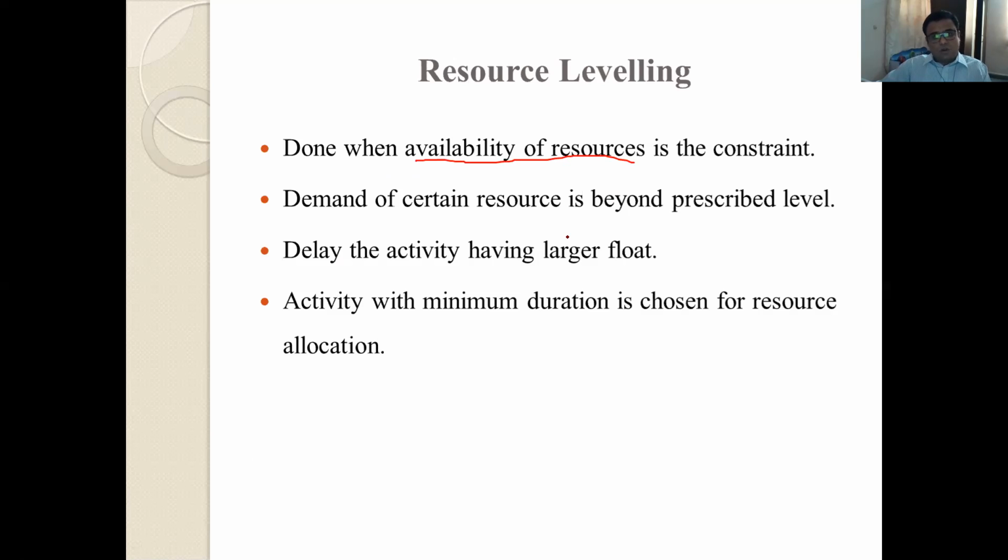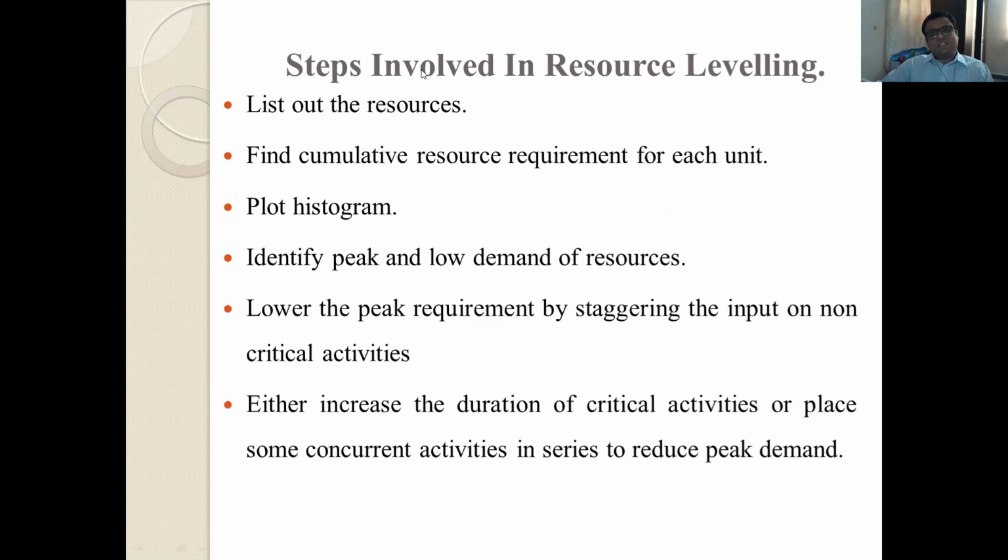Okay, so when we delay the activity, first we have to find out the activity with minimum duration, which will be chosen for the resource leveling. Okay, so these are the steps involved in resource leveling. List out the resources, find cumulative resource requirement for each unit, plot histogram, identify peak and low demand of resources.